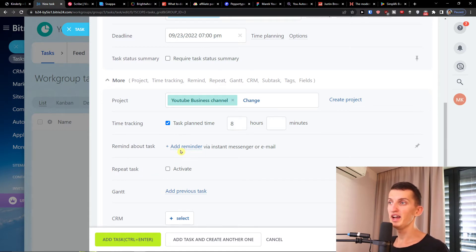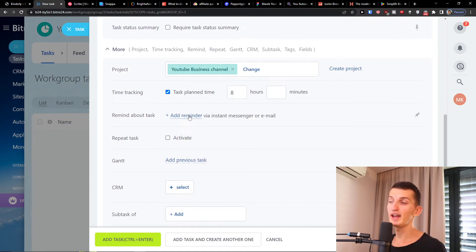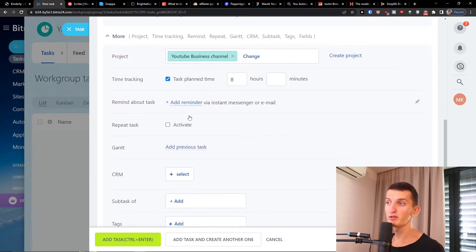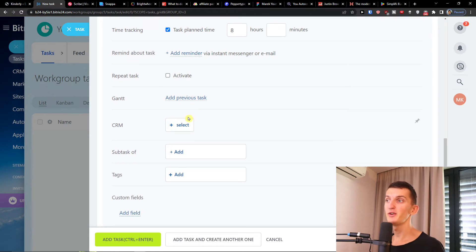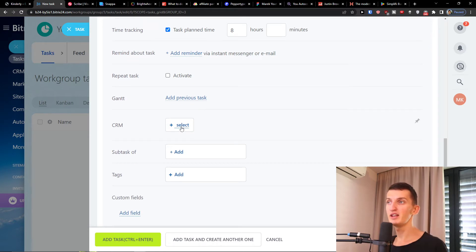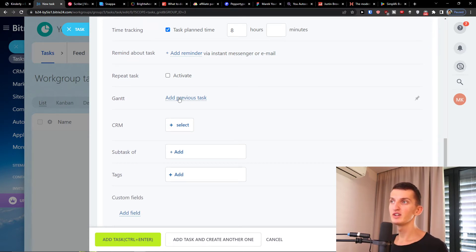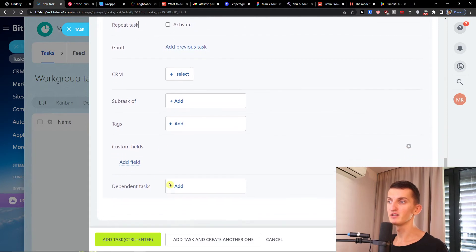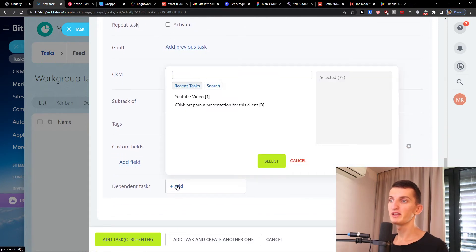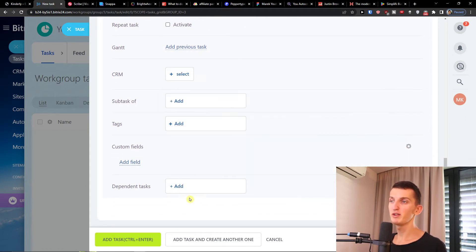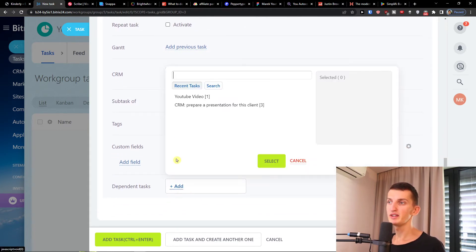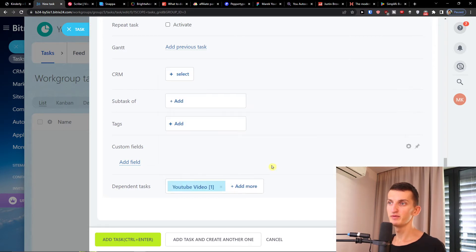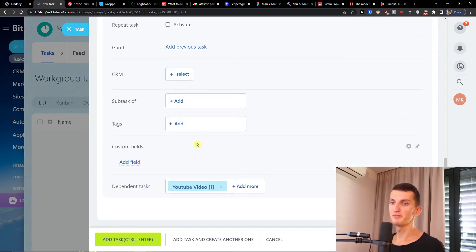You have repeat task, you can add a reminder about the task. If you have CRM you can simply add it here. If you have Gantt you can add it here, add a field or dependent tasks. If you're gonna have multiple tasks here you can easily add it, right? So on what it's going to be depended upon.